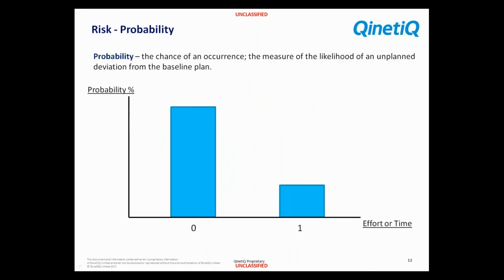Before we move on, the final distribution I want to consider is this one, which is a discrete distribution. And we use this in a particular case, as we'll see later on. What we do is we represent, when we're modeling, a 0 or a 1 as the outcome, the probability of a risk occurring. We said a risk is less than 100%, so sometimes it will occur and sometimes it won't when we're creating a model of the uncertainty and risk. So this is a mechanism for us to define what proportion of the time, what probability we have that the risk occurs or doesn't in our planning.